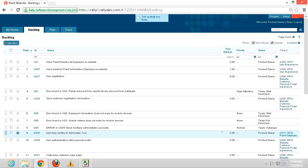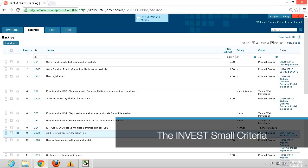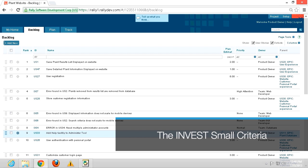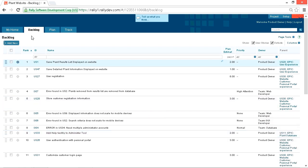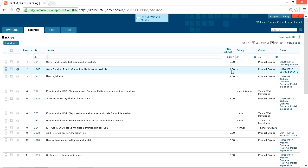According to the INVEST Guidelines, high-quality user stories are small or sized appropriately. In our product backlog here, we have some nicely sized user stories. Our story points are 1, 2, 4, 8, and 16, so we have some nicely sized user stories. These are small.